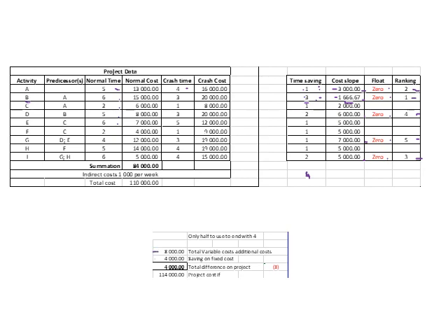And I think I've just cut off a section here where I actually just calculated that area, or that calculation of the total amount added. So it's 3,000 and then 3 times 1,666.67, which amounts to 5,000 Rand. So it's the 5,000 plus the 3,000 to give us 8,000.